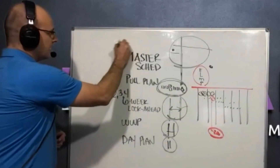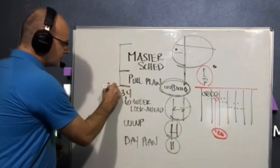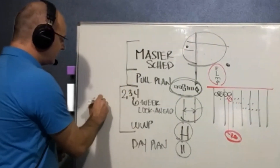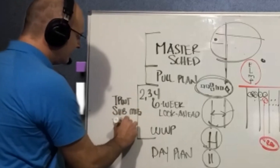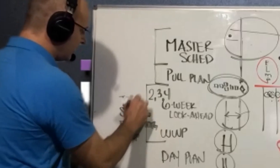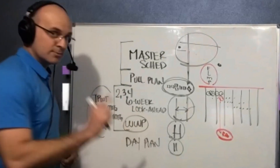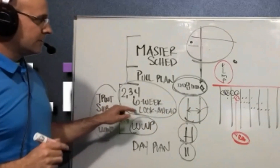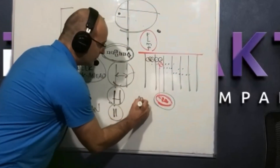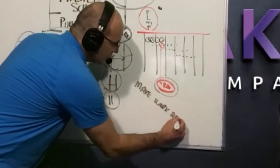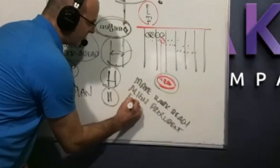The master schedule is reviewed on a weekly basis with your project team. Your pull plan happens whenever you need it. Your look-ahead schedule and weekly work plan are reviewed weekly in your trade partner weekly tactical — some call it the sub-meeting, trade meeting, or last planner meeting. This is where you develop a weekly work plan, review the look-ahead activities, make sure they're ready, identify roadblocks, make work ready, and align procurement so it hits those dates.